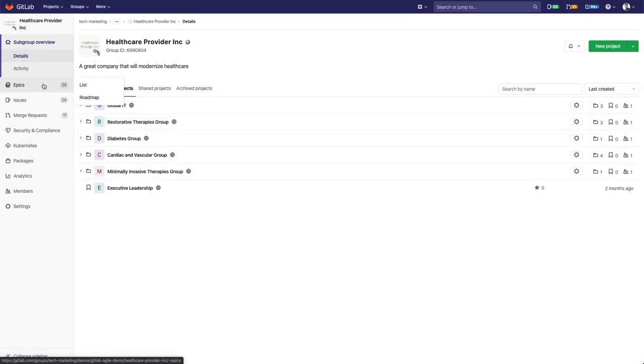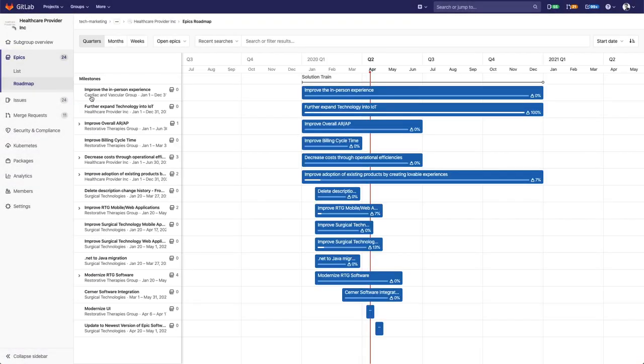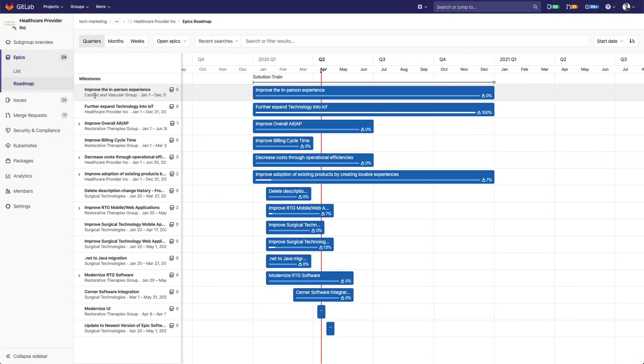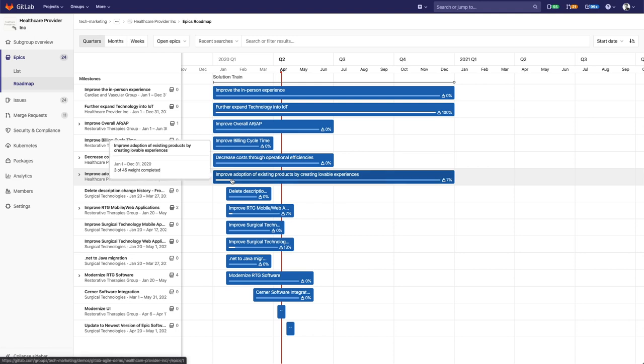GitLab Roadmaps can help by providing a way to organize and visualize your entire portfolio of work and they can help promote teams to see the overall plan and big picture of the work they are doing, no matter where in the world they are working from. Roadmaps provide a time-based summary view of the epics in the plan and also reflect percentage done, which helps you to assess whether or not the plan is on target.